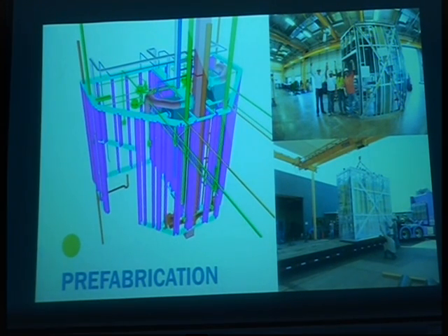California unions are very strict, and so we can't prefabricate this in a shop and bring a lot of different unions, the drywall unions, the electricians, the plumbers. Their union won't allow them to come into one place off-site to build something and then move it in. It was more economical for us to build it in Arizona. I'll run the video anyways. I'm sure we'll have an issue with the sound, but hopefully it comes out okay.